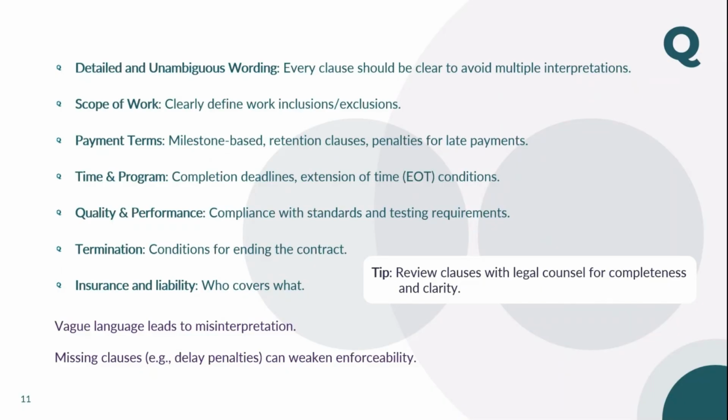So there is a time, duration is mentioned. If not met in duration, there is a penalty. And if there is an EOT, that also you covered. So time also you covered over there. Now, since obligations have been identified, time also identified.